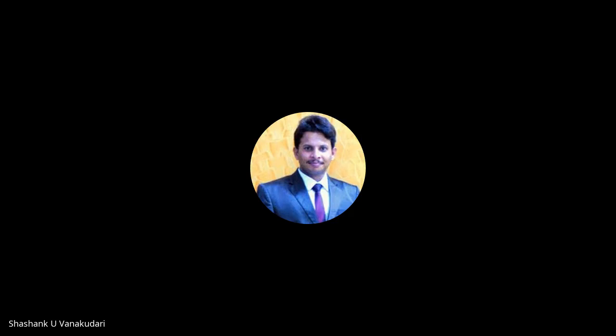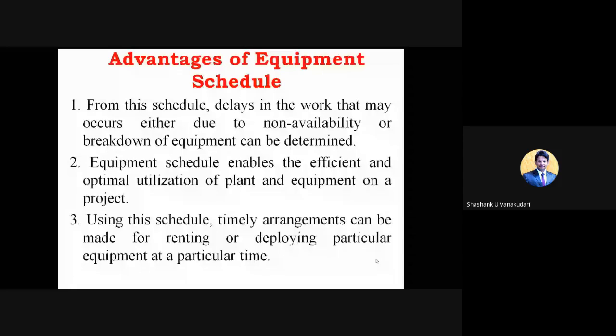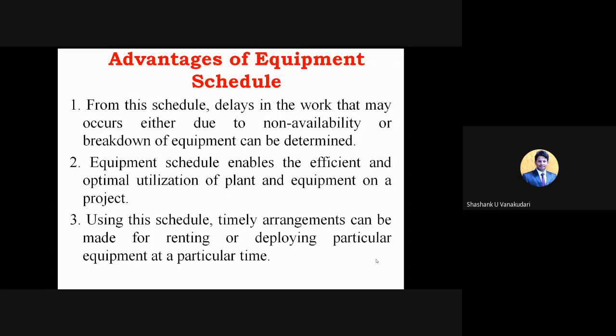We need to plan accurately while preferring the types of equipment, to avoid those total durations. The selection of equipment is the most important part with respect to the starting date and end date of the particular activity. Simply we bring that equipment and place it on the construction site. If we are not following the proper schedule, again we need to pay the rent for that equipment. So that should not happen.